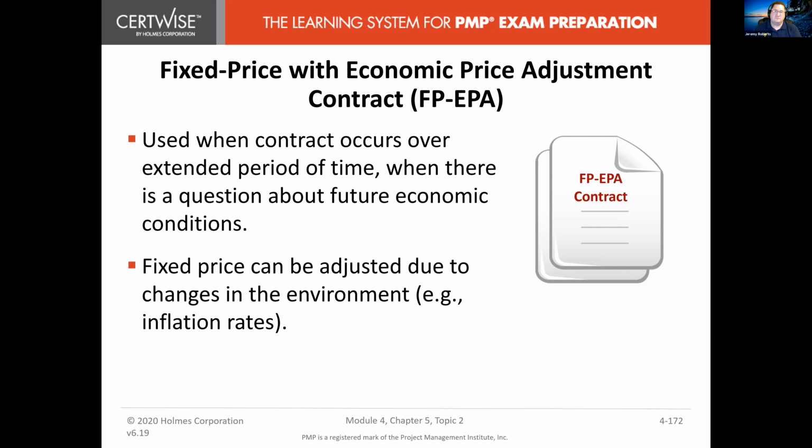So that kind of stuff can be put into other contracts. So UPS might have paid $3 a gallon, but their adjustments might have only allowed for a 5% increase. So they would be paying $3.15 when gas was actually $6 a gallon or $5 a gallon at the pumps. So UPS, because they had a long-term contract, made out really well.